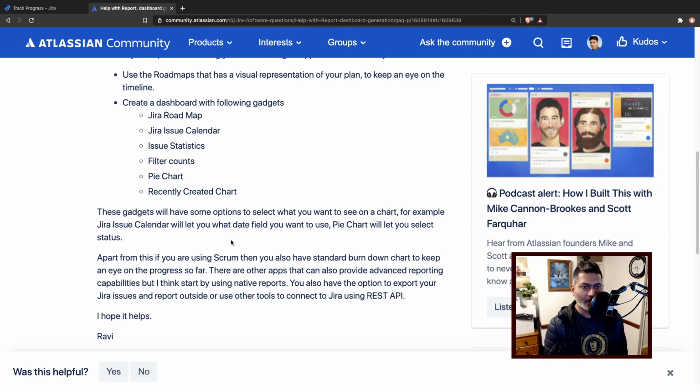And the good thing is that Jira can also generate a CSV of issues that you can maybe open in an Excel sheet, for example, and create macros. What I used to do was populate my Excel sheet with issues from Jira, and run my own pivot charts and do my reporting. Of course, when you're using Excel, you can do a lot of wonderful things. You can maybe create a macro to simply generate a report by clicking a button. That is one option. You can also use other external tools that can talk to Jira using REST API.